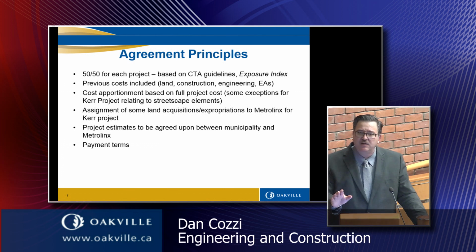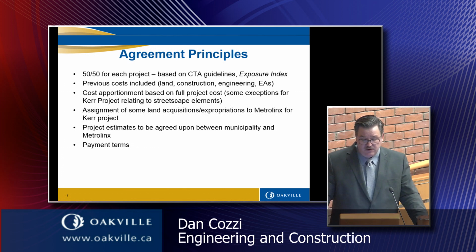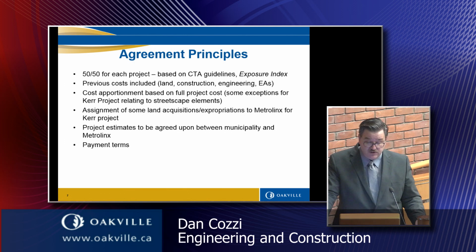Our share may be slightly more than 50%, but not much more. The assignment, the agreement principles, includes that Metrolinx is going forward with some of the land acquisitions, and we're dealing with others. And another key point that we negotiated in our verbal agreement is that the project estimates are to be agreed upon between the municipality and Metrolinx.